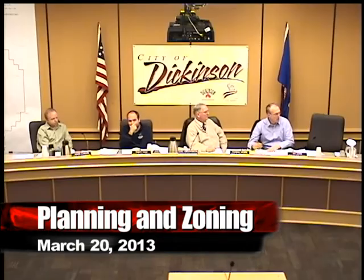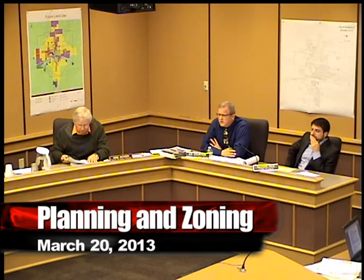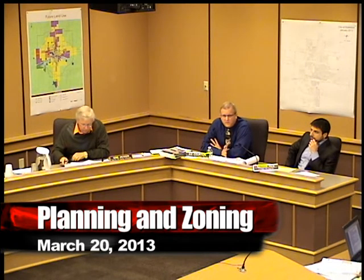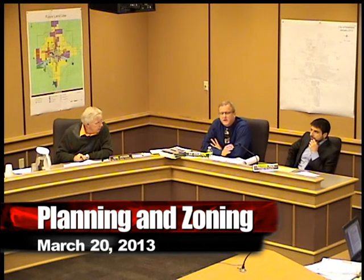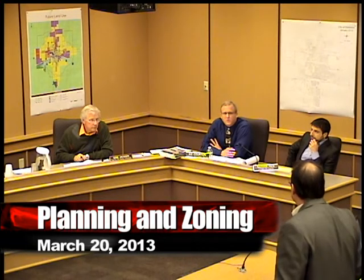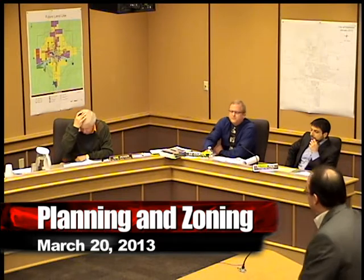Mr. Corton? Mr. President, I just wanted to convey to the developer, and we did this initially, that a mobile home park has dramatically different standards from a mobile home subdivision. And if you have any plans of selling those lots, your plan will not work. The road configuration, everything would have to be revised. So I just want that to be on the record. If 10 years from now you come back and want to do that, your utility lines won't work because they'll be designed for a mobile home park compared to a subdivision. The lots will be, the roads will have to be dedicated, all that. So that's understood. Thanks, Ed.